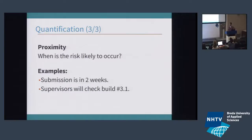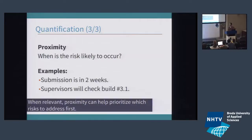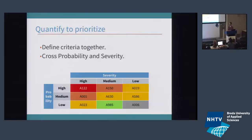Finally, there is proximity — when will it happen? Is it going to happen next week or next month? All else being equal, the project manager will focus on the one that is next week, at least if you think it's still salvageable. If you put all these criteria together, you can make a matrix of probability and severity — a prioritization matrix.